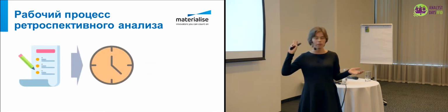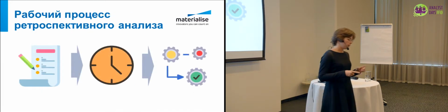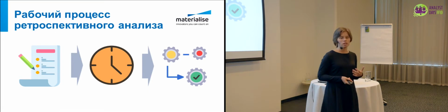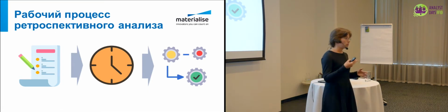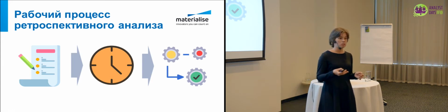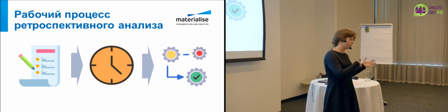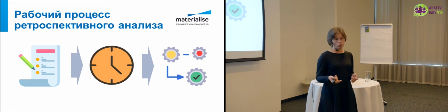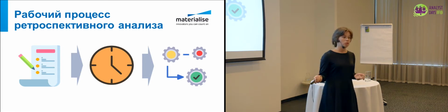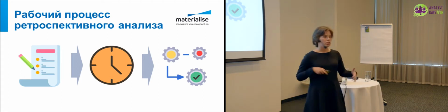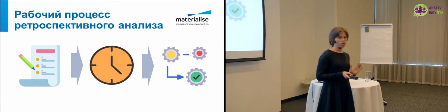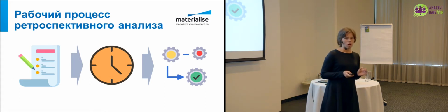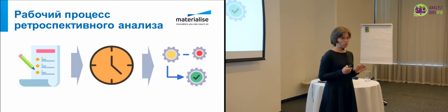The regularity was not enough, and we decided to add to the analysis phase, to the responsibility of an analyst, the point that he had to add metrics of the project quality being implemented, and the developers have to implement it. So we started to broaden our idea with each project, and the system worked quite well.